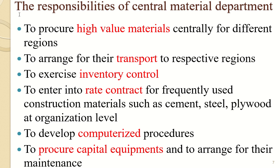Moving to the responsibilities of the central material department: the first responsibility is to procure high value materials centrally for different regions and arrange for their transport to respective regions. They also exercise inventory control — that is, control the stock — and enter into rate contracts for frequently used construction materials such as cement, steel, and plywood at the organization level.